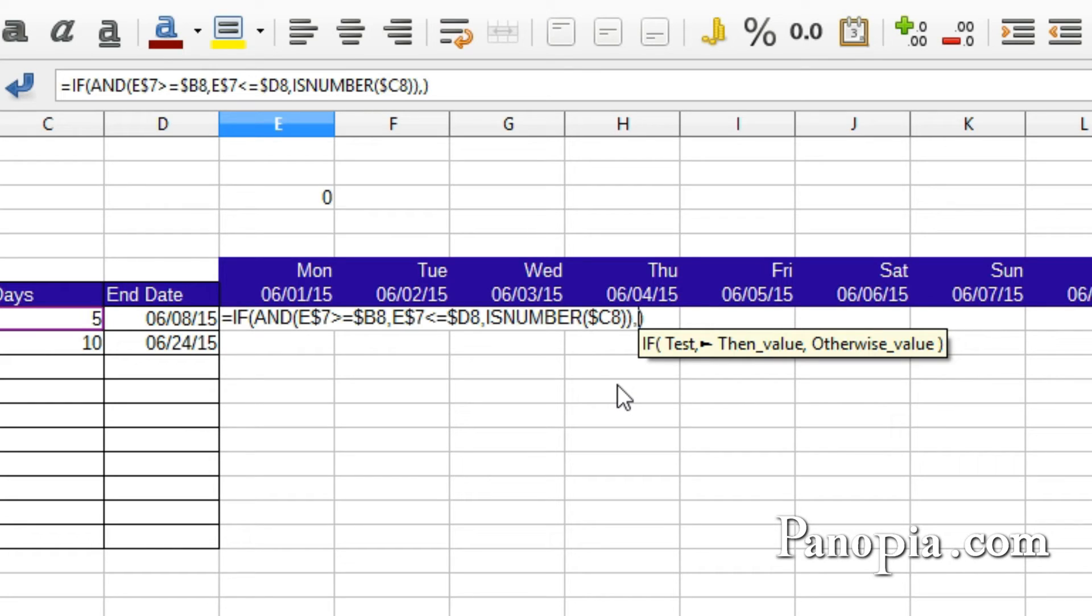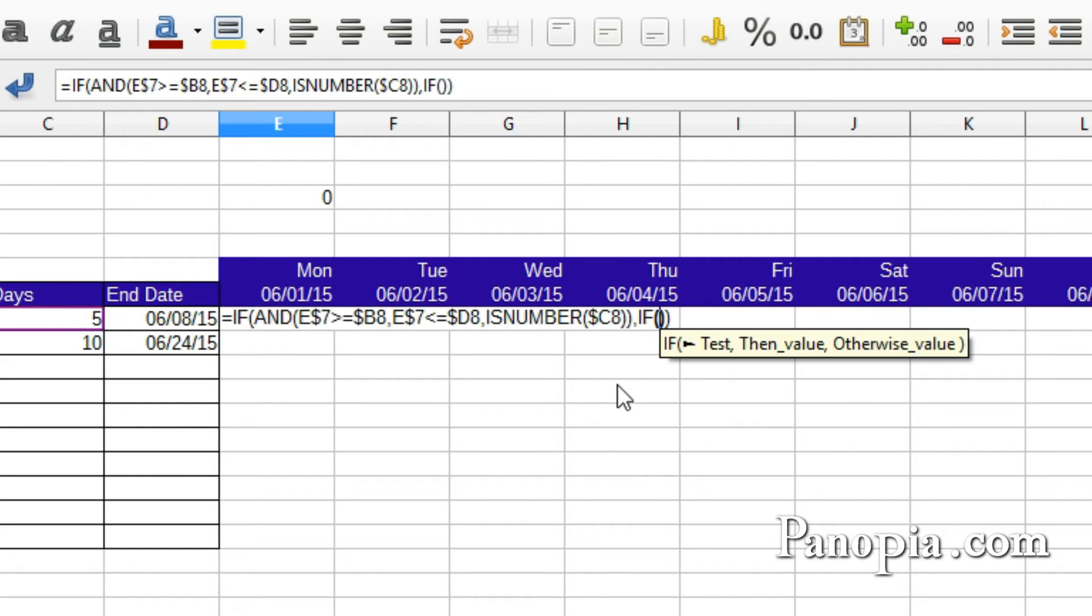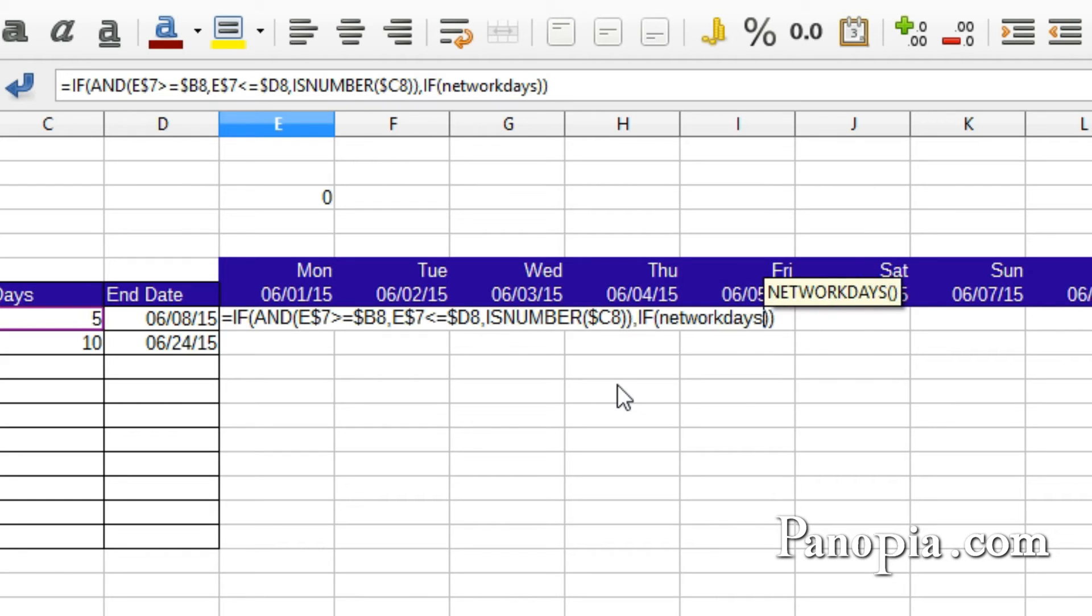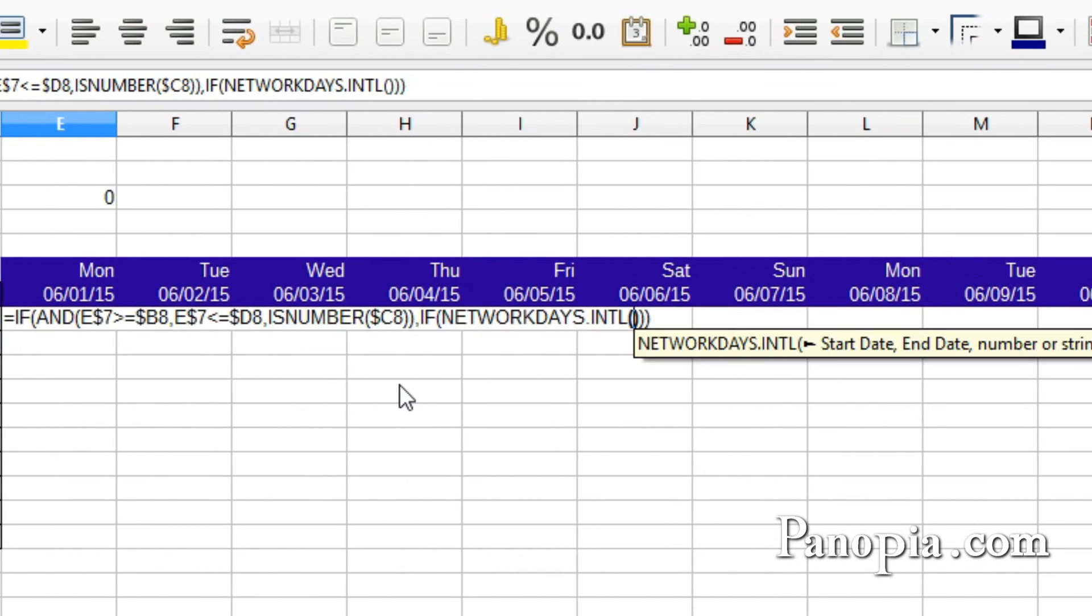If the date is a workday, I want it to put a W in the cell. If not, I want an H in the cell. So type IF, press Enter. To determine if it's a workday or a non-workday, I will use the NETWORKDAYS INTERNATIONAL function. Type NETWORKDAYS.INTL, press Enter.